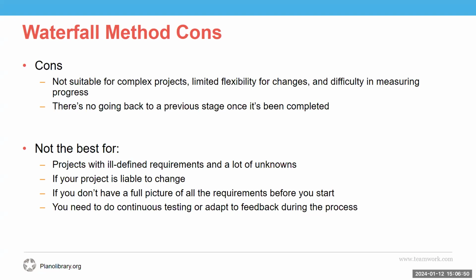So say something goes wrong in your construction phase and you need to go back to planning. In the waterfall method, you cannot do that. So it's not the best for projects with ill-defined requirements and a lot of unknowns. If your project is liable to change, if you don't have a full picture of all the requirements before you start, or you need to do continuous testing or adapt to feedback during the process.